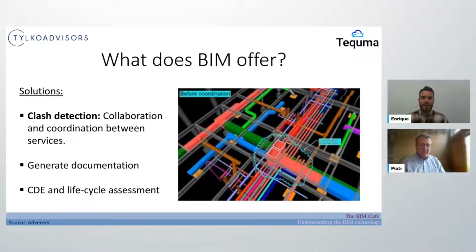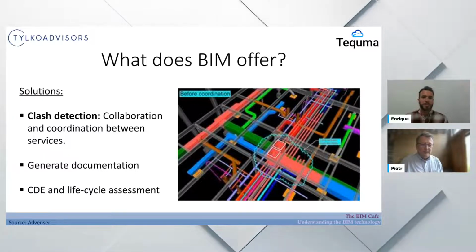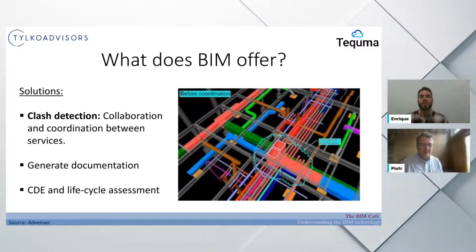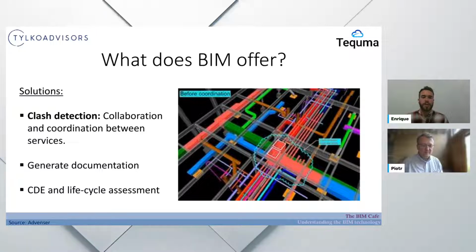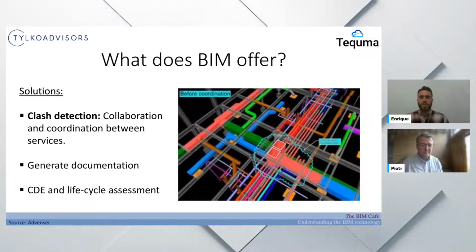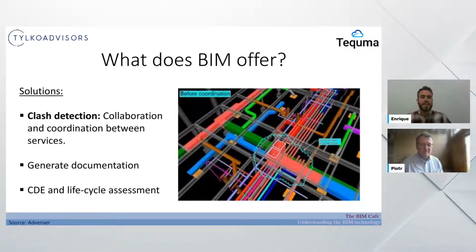The example I said before: I'm running my electricity network, and then there is some pipe for the water that needs to be also in place. But I'm not going to do my design considering the pipes during the whole process. So we just do our design, we overlay each other, and we see how they merge. You will have some requirements to go to a certain level or not, but basically, in large projects mainly, is where you can find some potential clashes.